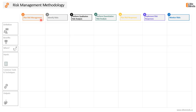The seven steps of a risk management methodology will start with planning risk management, then we will identify the project risks, then we will perform the qualitative or subjective analysis, quantitative or objective risk analysis, and then planning the proper risk responses, implementing risk responses, and finally we will monitor and close the project risks.